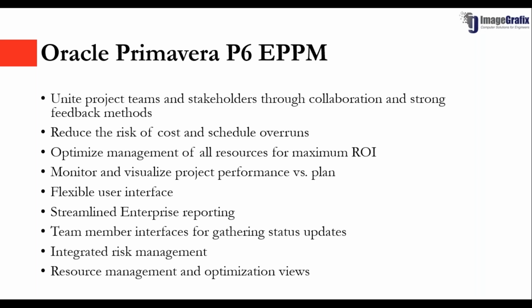Using Primavera P6 Team Member, you can gather information and status updates in real time. Instead of your planning engineer, you can assign tasks or activities to your team members so that they can update the status back in the field using the mobile application. They can update the progress and discussion items, and they can even take pictures and attach them using the mobile application, which I have shown you here.